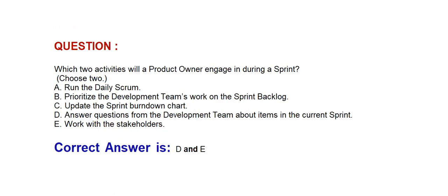Next question: Which two activities will the product owner be engaged in during a sprint? Choose two options. Option A: Run the daily scrum. Option B: Prioritize the development team's work on the sprint backlog. Option C: Update the sprint burn down chart. Option D: Answer questions from the development team about items in the current sprint. Option E: Work with the stakeholders. Correct answer is Option D and Option E: Answer questions from the development team about items in the current sprint, and work with the stakeholders.